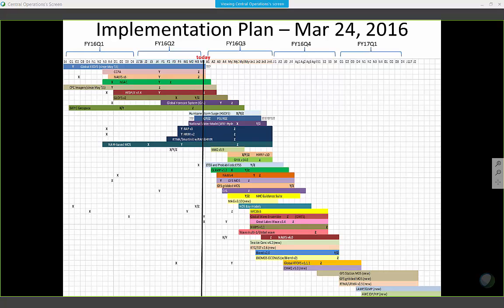Oh, I'm sorry. I missed she was asking about the 23. Yeah, that's 23. The 23 should be in by now. And then the next step is to go to the West Coast. Yeah. And for the West Coast, we have to figure out how to do that, but we're already running all the West Coast offices in EMC parallel. It's really a question of adding applications. It's not a serious change to the operational system. It's just adding more WCOSS to work on that.